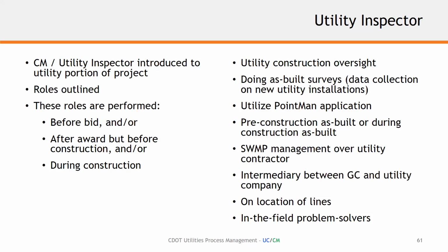CDOT does have utilizing new mobile technology. It's a mobile app called PointMan. This mapping program is utilized for many different things during the utility construction side. For instance, the PointMan mobile app is utilized for one called ticket management for construction. It's also utilized for the as-built surveys and real-time data uploads into CDOT's database, utility database, and it's also there for documenting construction observations. So just the construction activity itself, we have forms built into the mobile application that will help document what is going on with the particular construction activity.